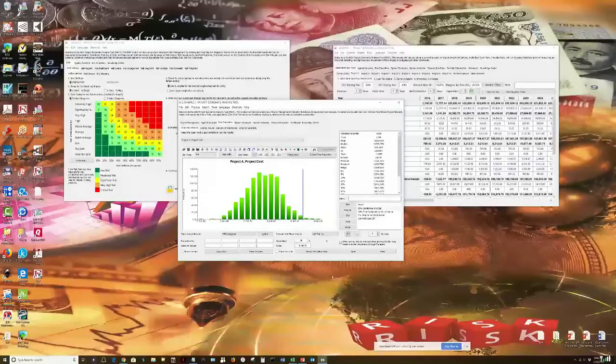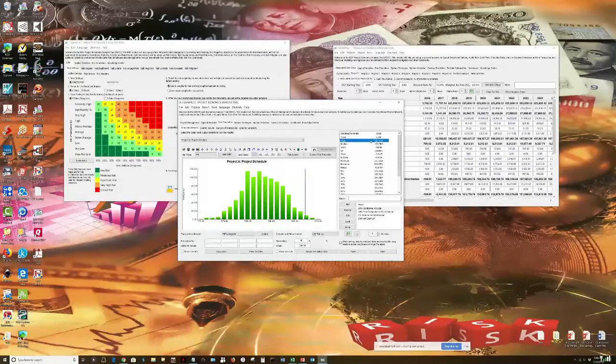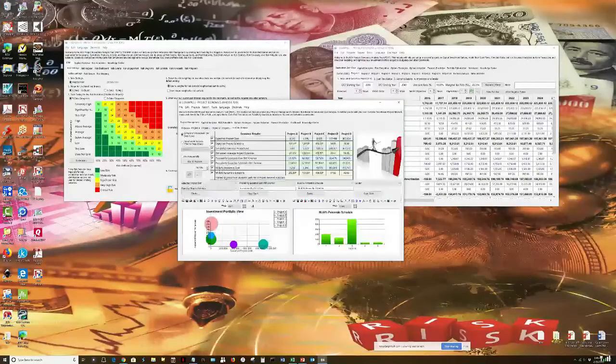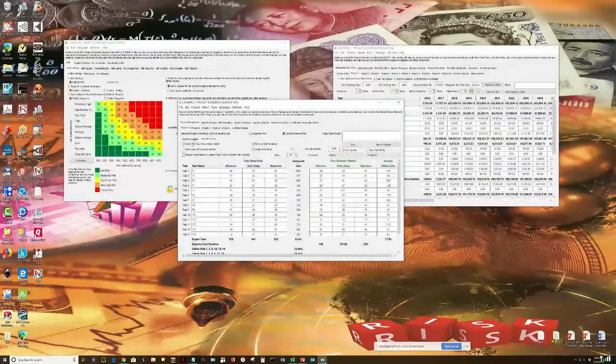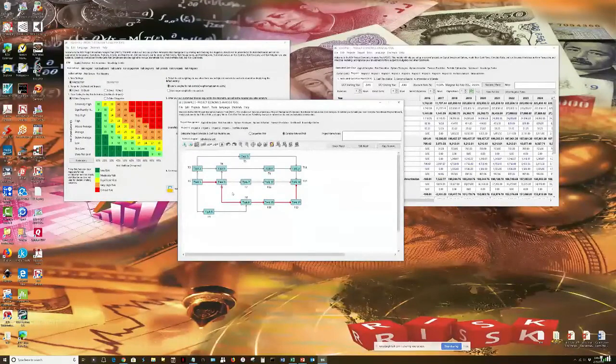You can also do the same thing for schedule. So it might take 193 weeks or days that you will complete. But if I really like my job and I put a 99% confidence here, instead of 193 days, I will ask for 209 or 210 days or 210 weeks. So that's my additional buffer of like additional 17 days or 17 weeks, so that I know, given all the uncertainties that may occur in each of these projects, okay, so plus or minus, task 1 might take between a week and 3 weeks.